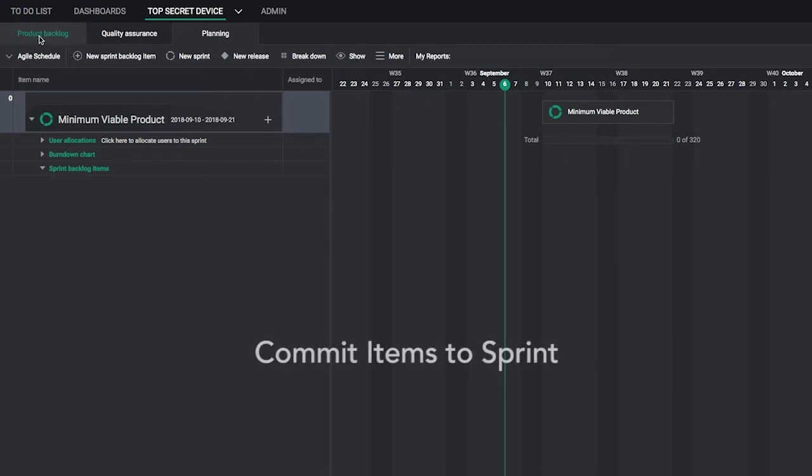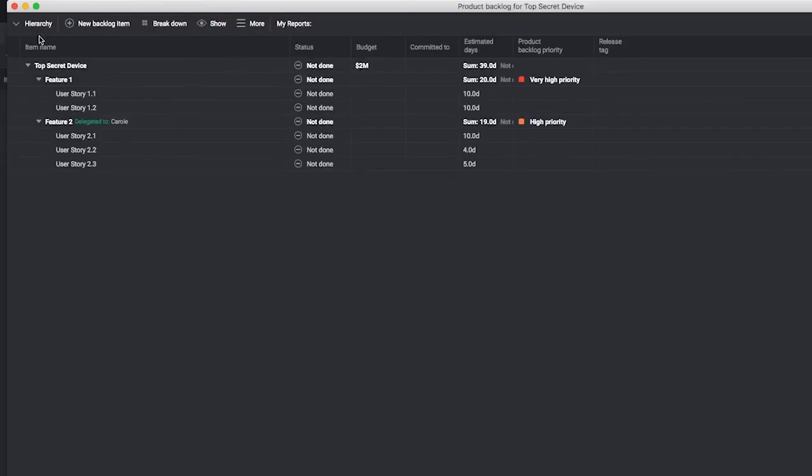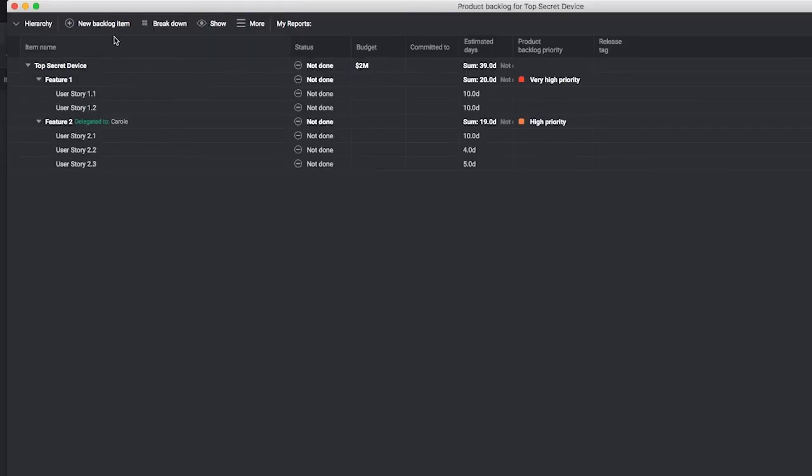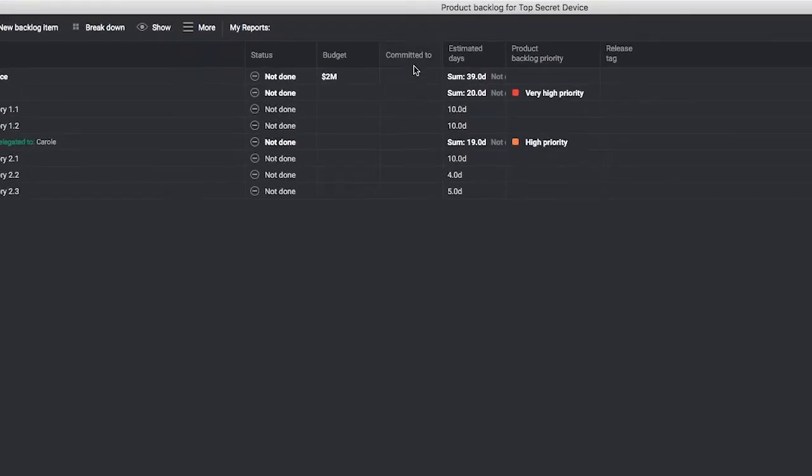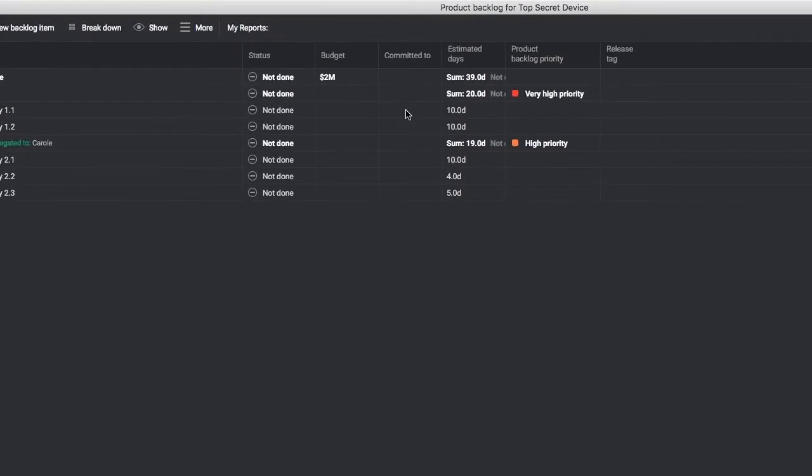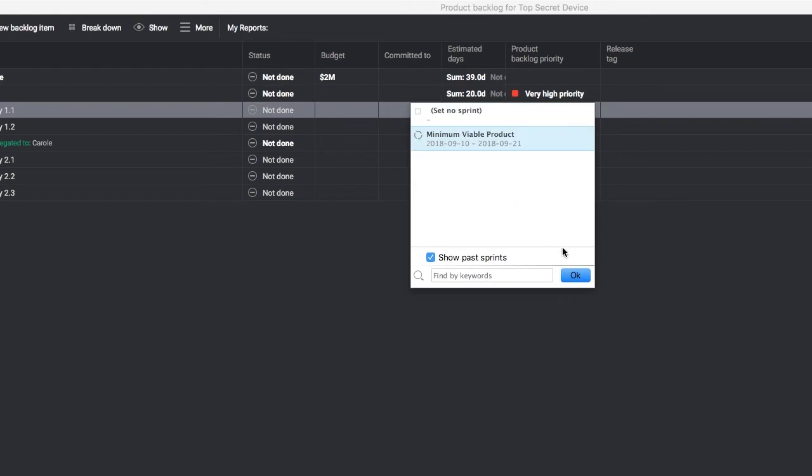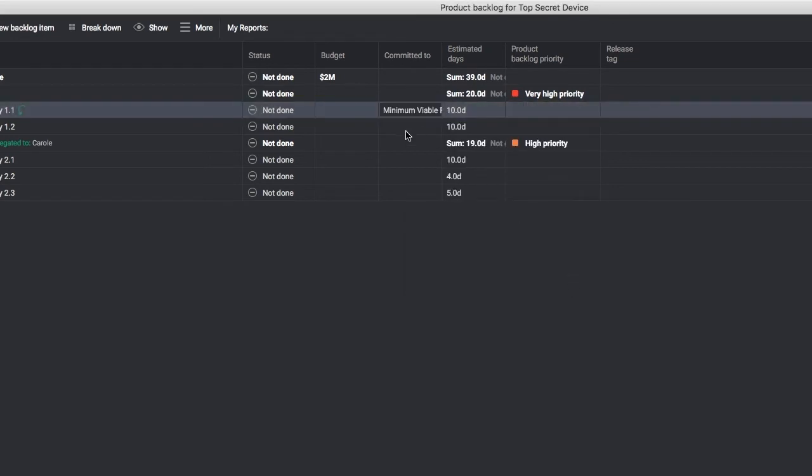Return to your product backlog view. Double-click the Committed To column of any item you want to add to your sprint, and add it.